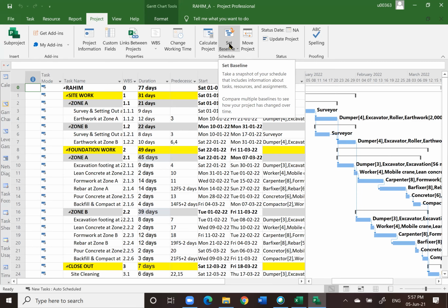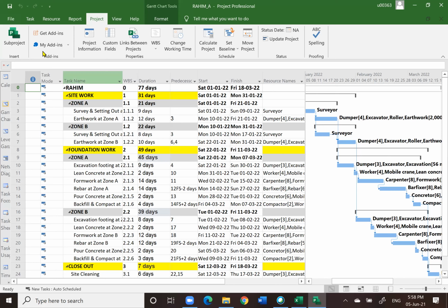Variance is the difference between what we call plan and actual. The difference between what you planned and what actually happened. Otherwise, the computer cannot give you that information because you did not log the values at the beginning. So now we want to set a baseline, as if we are taking a selfie of all, not only the information that you see here, but behind it, all the data.